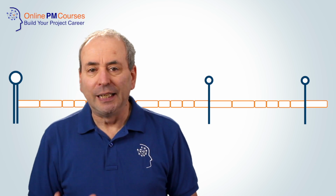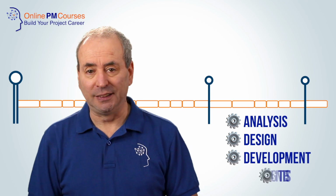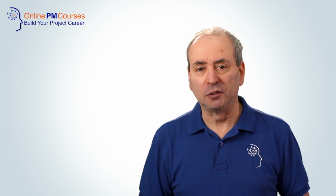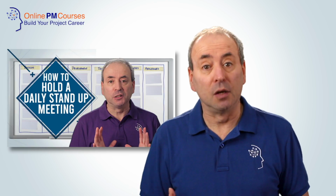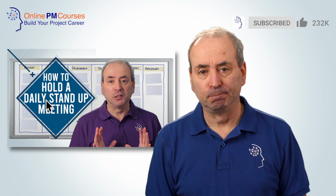However, what is important is the concept of these increments of delivery rather than the actual duration of the sprint. During the sprint, the team takes each feature through the standard process of analysis, design, development, and testing. And the team will meet regularly and frequently to compare notes with one another and to make sure that everyone understands where we are. Most often this is daily, and the daily meetings are sometimes known as morning stand-ups, or in Scrum as daily scrums.